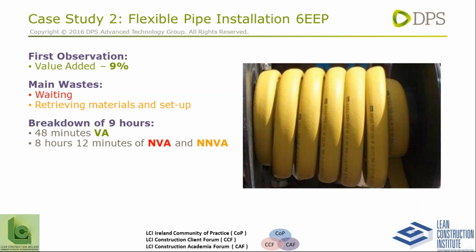Retrieving materials was also down to the location of where the materials were stored. And setting up for the day was basically the guys were coming in and setting up on the day they were supposed to be building. So it was maybe 10, 11 o'clock in the day when they were ready, they had all the materials and now they're ready to go. Whereas if you plan the day beforehand, you don't have to deal with all that stuff on the day.